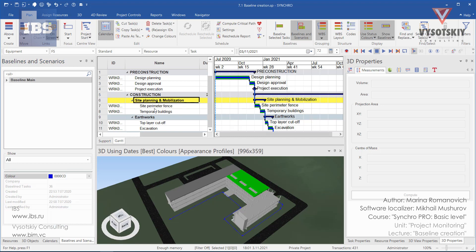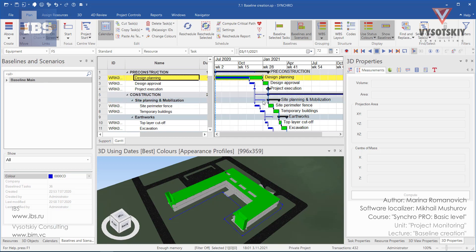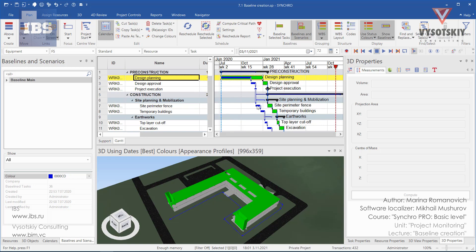From now on, all future changes in the schedule will be compared with baseline main. If one task will be delayed, we will see how it affects our baseline main.